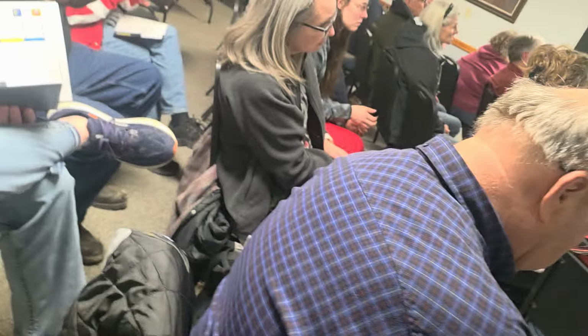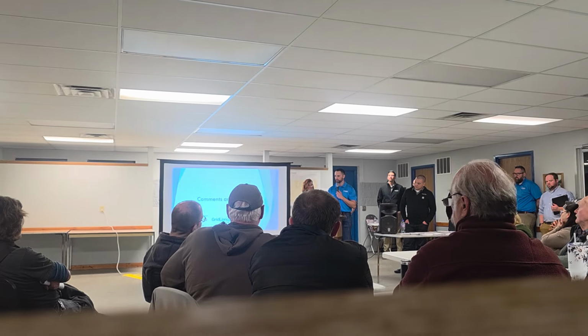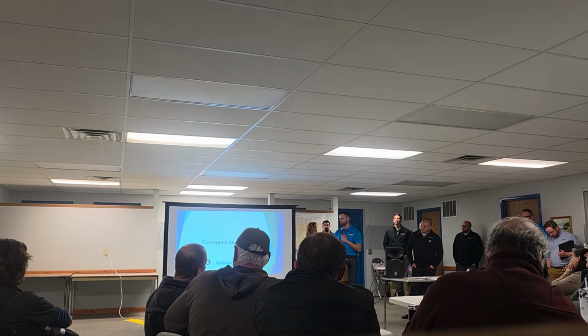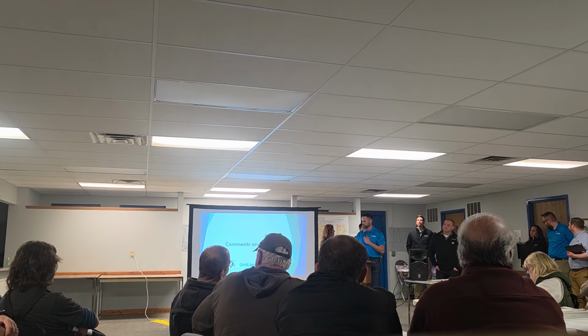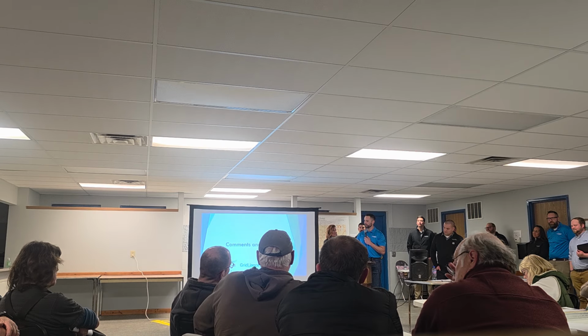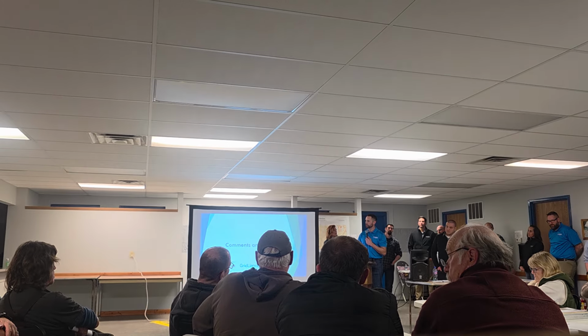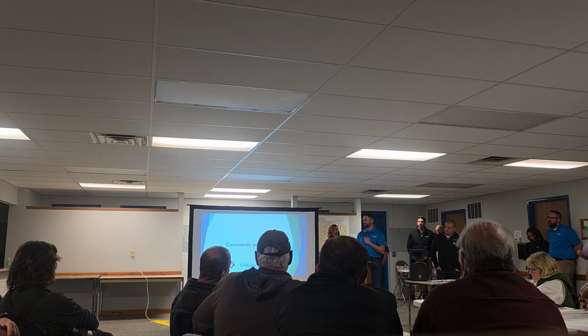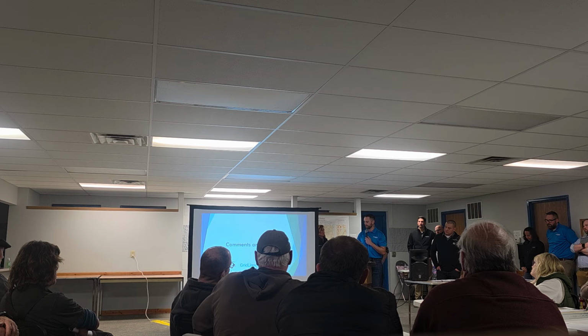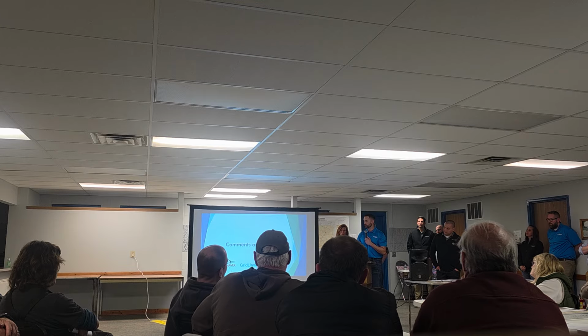Our goal is that we adhere to all management of traffic plans that typically will be partnered with local communities. Like you talked about the weight band, we figure that into the schedule as a schedule risk item. But directly to address your question about damage to roads, our contractors will be responsible as part of this project to repair damage to roads caused by construction.